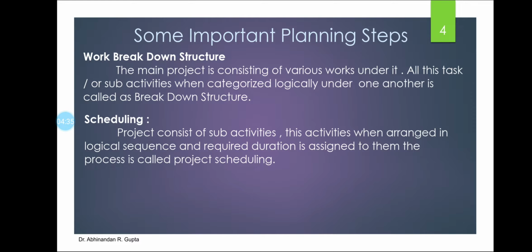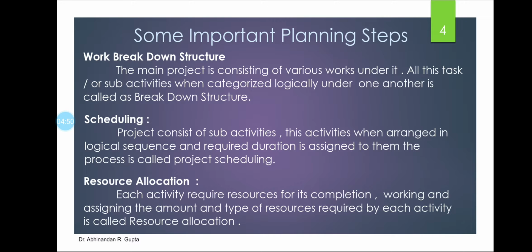Similarly, for the construction of a building, until and unless you do the work of substructure, you cannot start the work of superstructure. So to logically arrange the activities in sequence and then to assign the duration to them is called scheduling.